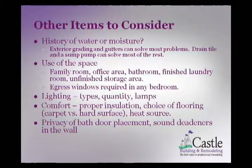We're also getting a lot of the bedroom in the basement, usually one, and then egress is required in any bedroom. As I said, be careful with that because the bedroom is somewhat interpretable. The classic description would be a room with a door and a closet. But I have run into it where it's a room with a door and they're like, well, you're going to roll a wardrobe in there when we're out of here. So just make sure what the expectations of the local inspecting authorities will be as far as that goes.